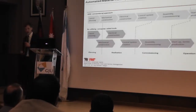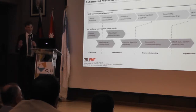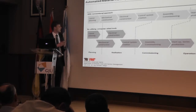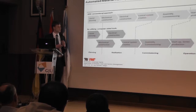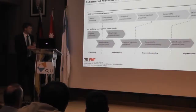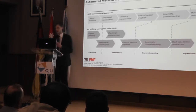Looking at the state of the art and the whole system lifecycle — when you start with the idea of creating a factory or an automated material flow system, different steps must be conducted: layout planning, mechanical construction, electrical construction, then the control system. This is the conventional approach, as it was maybe 30 to 50 years ago with hardwired control systems, then assembly, commissioning, and start-up for production. Meanwhile, computer-aided tools were integrated into this process from the first idea until start-up.